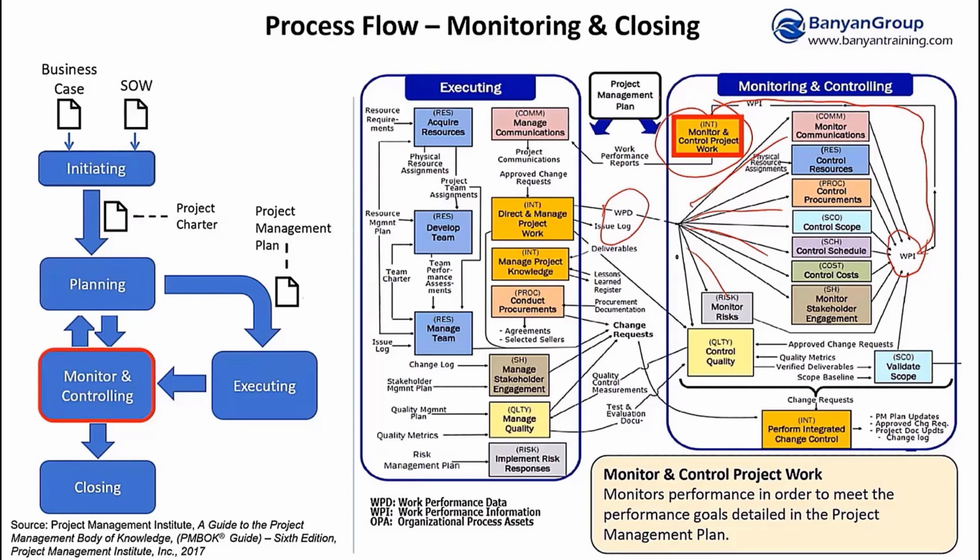It's maybe written in project management language like CPI and SPI, but then we translate those cryptic performance numbers into more meaningful language like we're 3 days ahead of schedule or we're $10,000 over budget, into language that stakeholders can understand, and put that into the reports that get distributed to the stakeholder community.